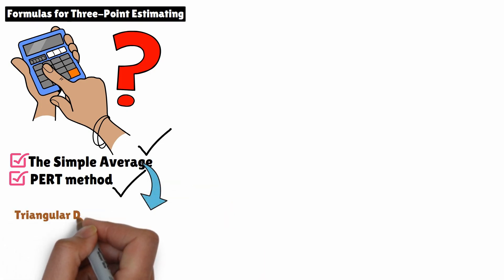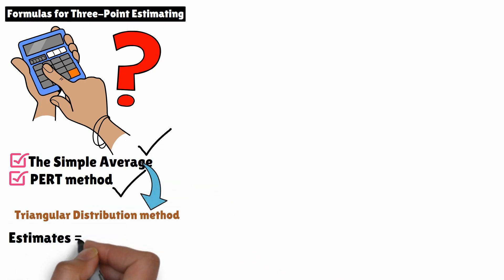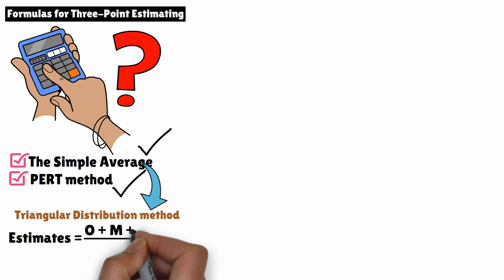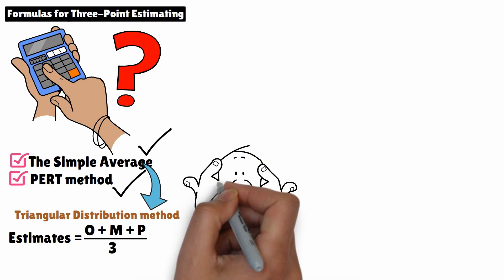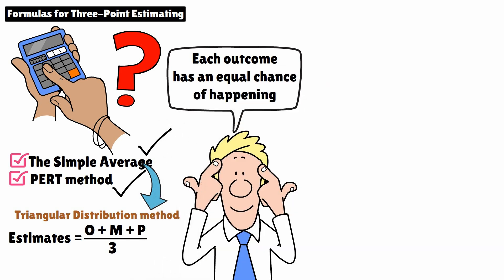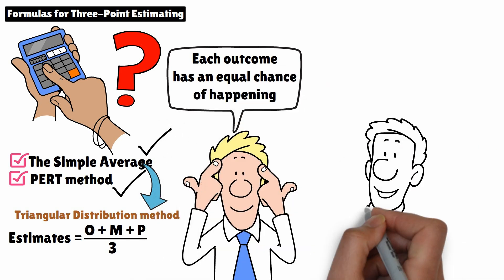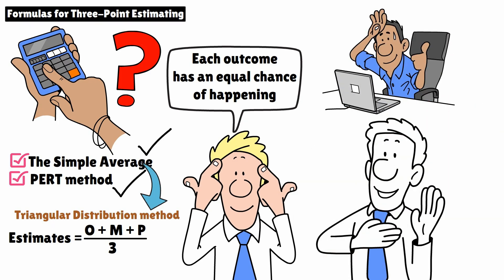The simple average, also known as the triangular distribution method, gives equal weight to all three estimates — optimistic, most likely, and pessimistic. You simply add them up and divide by three. This method assumes that each outcome, whether optimistic, most likely, or pessimistic, has an equal chance of happening. It's straightforward and works well when you don't want to favor any particular scenario over the others.